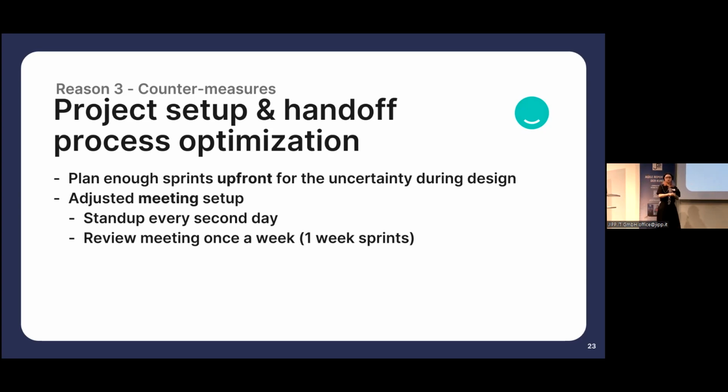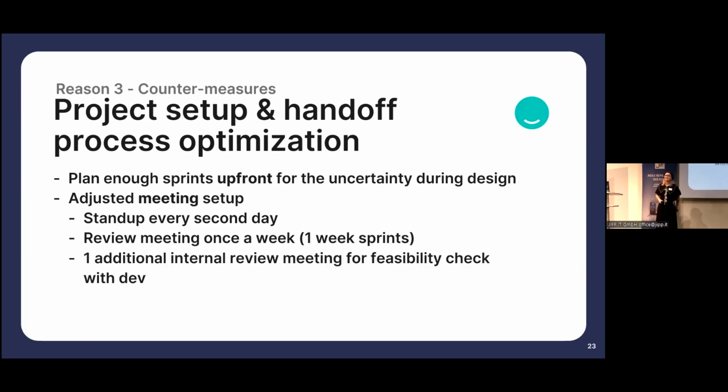They say, I want a registration. You show them 20 screens of registration flow with the different states and everything. They're completely overwhelmed. They cannot sign it off immediately. They cannot give proper feedback. You need to do more review meetings with a smaller amount of work so that the client or the stakeholder can say, yes, this is it, continue.